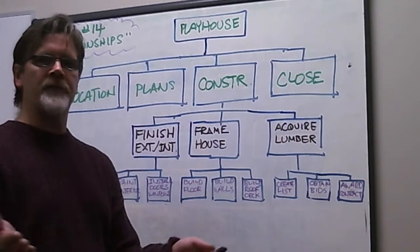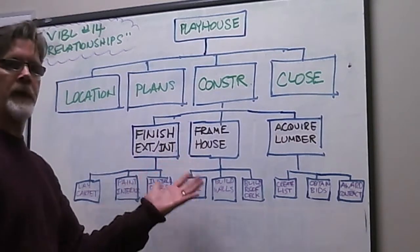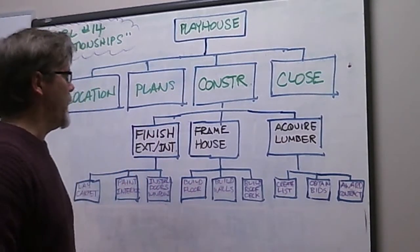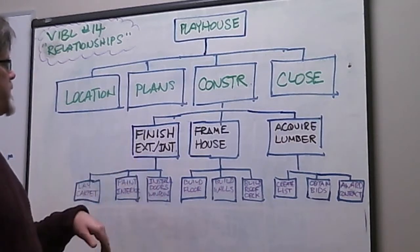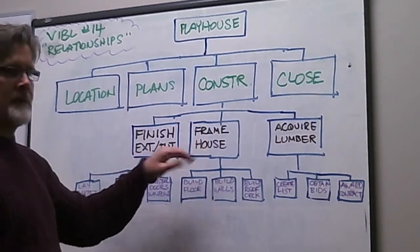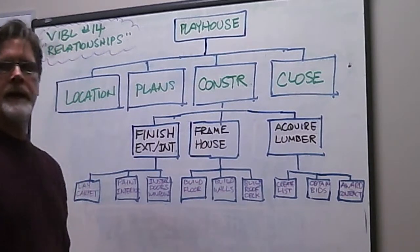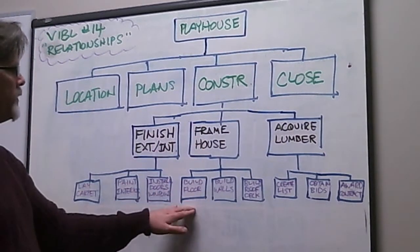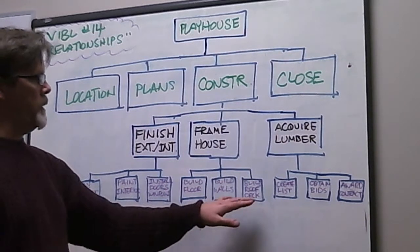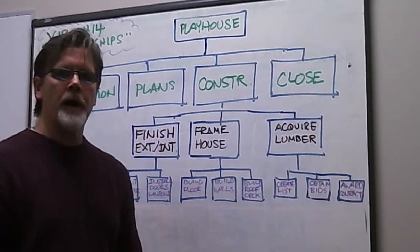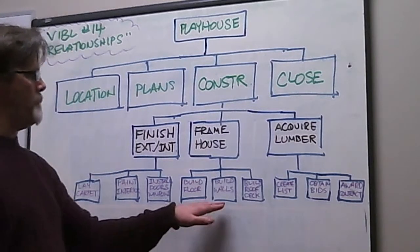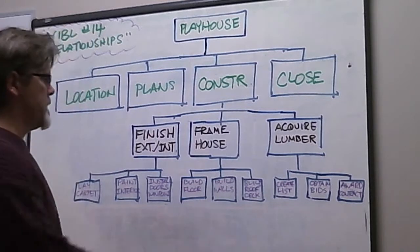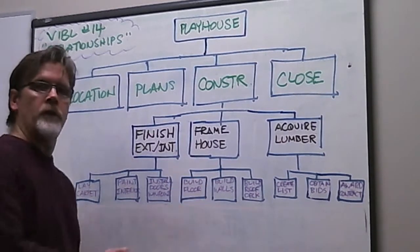What's an example of a finish-to-start relationship with the playhouse? As we focus on the summary task of constructing the playhouse, we have work packages of exterior finish, interior finish, framing of the house, and acquiring lumber. Looking at the framing work package, we have activities: build floor, build walls, and build roof deck. Hard logic tells us we can't build or frame the walls on top of the floor until we've actually built the floor.